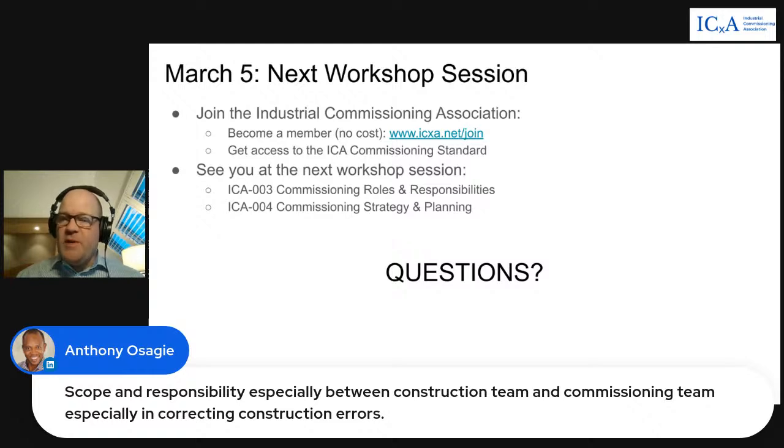Scope and responsibility, especially between construction team and commissioning team, especially in correcting construction errors. Yep. And the problem with involving commissioning folks later in projects is if you define this system handover function to the commissioning groups after they've already started, well, they've already made their plans. They've already got their equipment procurement lead times arranged. They've already arranged their large workforces to do the work. And if the commissioning folks show up halfway through construction and start talking about, well, we need this changed and we need this system, of course they're going to be upset. They're getting information that they should have had probably a year or two prior so they can properly plan their work. So it's not fair to construction groups to involve commissioning late in projects.